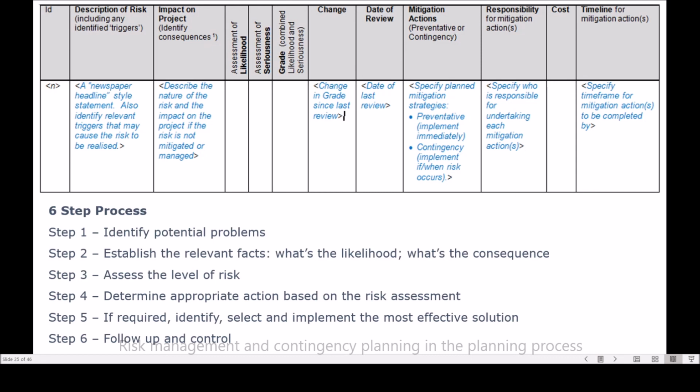the plan, if it's a significant endeavor, we would then create some type of risk register or risk management plan that captures everything that we just talked about. We would describe the risk, we would describe the impact on what we're trying to do, we would grade the likelihood and seriousness depending on which tool we're using. So if it was one earlier, it would be something like very low or rare or likely, and make a determination, or we might be using the numerical system within that. But we make our assessment of the risk.